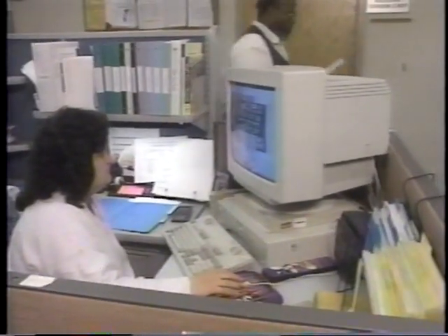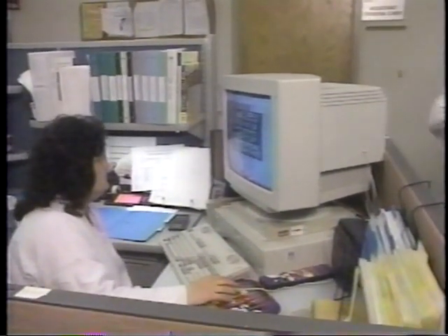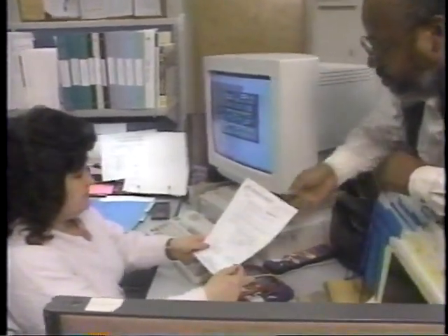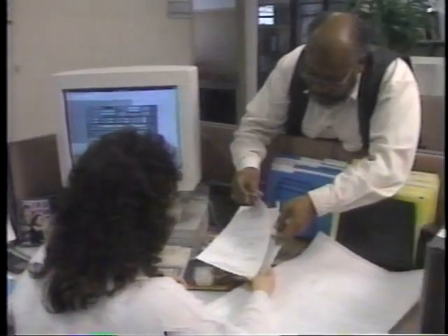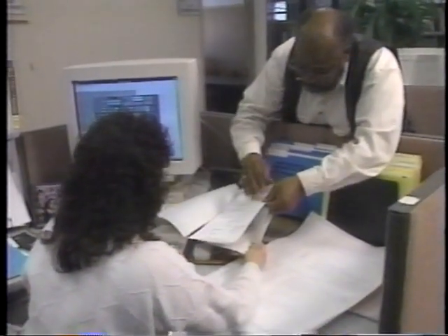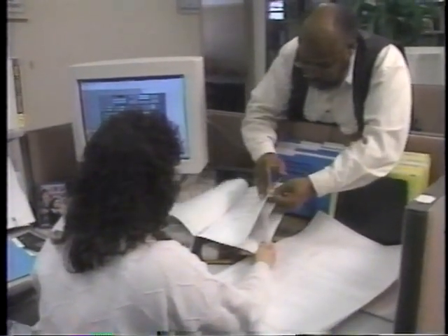The selected frequency should also coincide with that of other construction reports. If current construction reports are prepared on a 4-week period basis, then the frequency of manpower usage reports should be compatible.